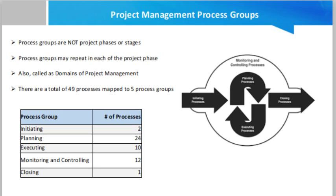Whenever we talk about project management, process groups are described in the Project Management Body of Knowledge. There are five process groups: initiating, planning, executing, monitoring and controlling, and closing. Initiating has two processes, planning has 24, executing has 10, monitoring and controlling has 12, and closing has one.